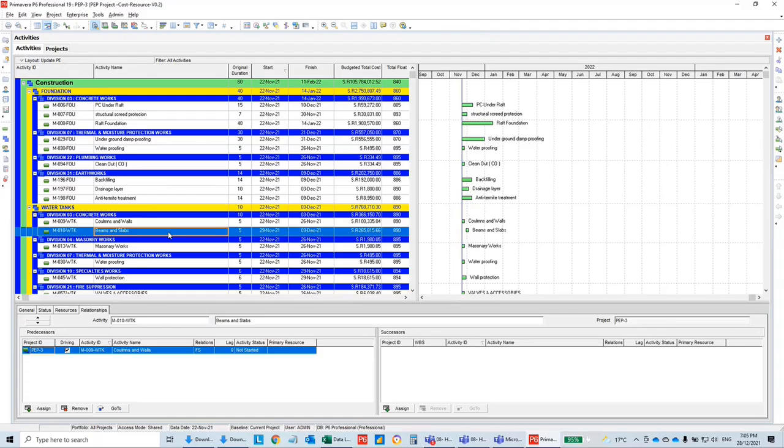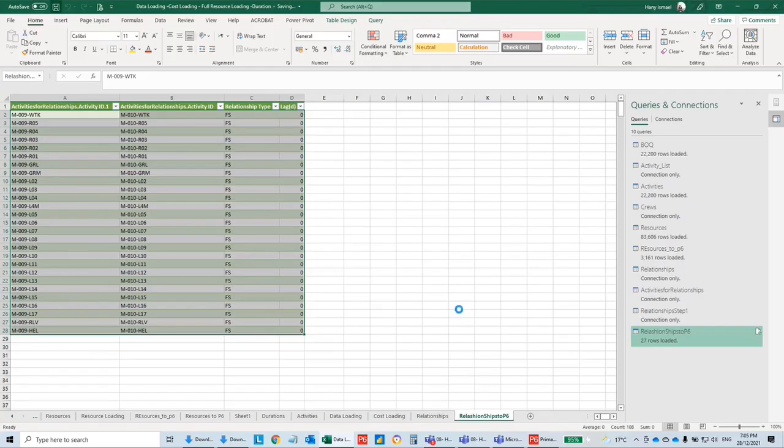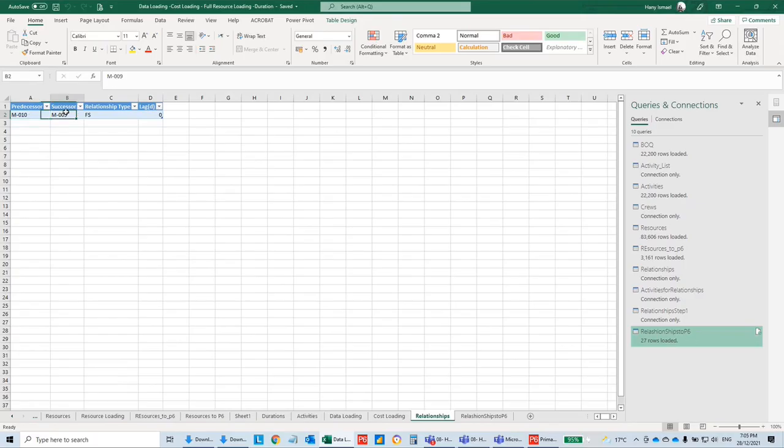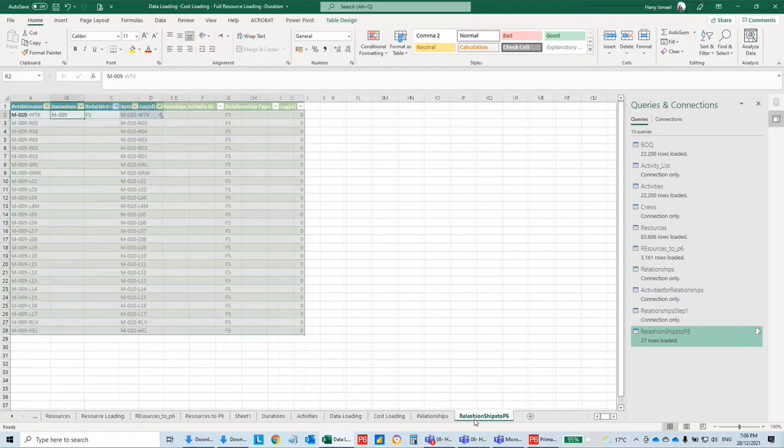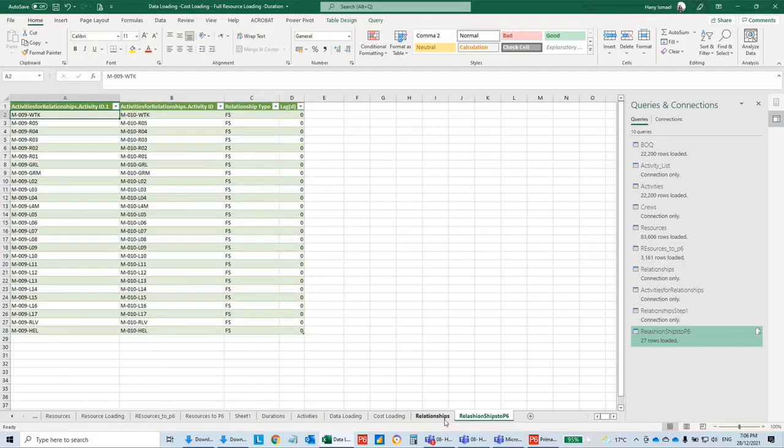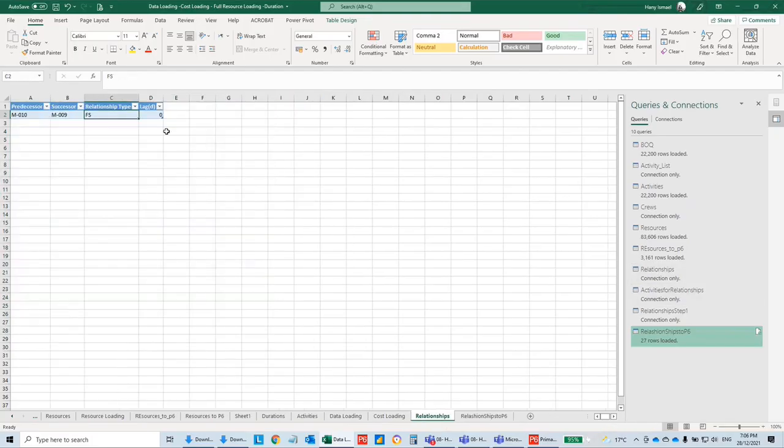Okay, so let's review what we did. I need you to understand this one because if you understand this concept, it will help you a lot. Again, what you did, Yahani, let me tell you. I did here something like a relationship where I can define any master activity as a predecessor and put the successor for it, okay? And then the query will search all relevant activities in my schedule and will create for me these relationships.